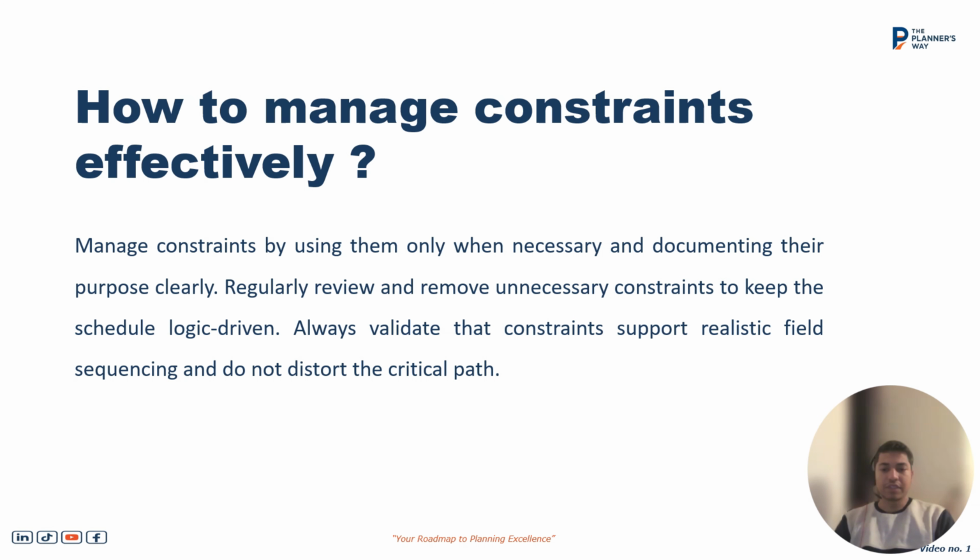How to manage the constraint effectively? For that, most planners, wherever they have put a constraint in the schedule, will note it down or document it properly. Secondly, we can regularly review and remove unnecessary constraints in any schedule, which can be done by thorough understanding of the program, going through each of the logics in the schedule, checking whether the logic is properly replicating things, and if unnecessary constraints are placed in between, we can just take them out.